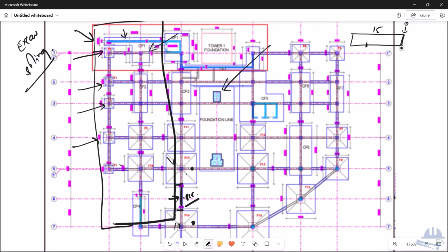So this is my reference line. Soling takes a total of 6 days, and day 2 is gone over here. So how many days remaining? 4 days, right? So before the excavation finishes, 4 days before, you have to start the soling.